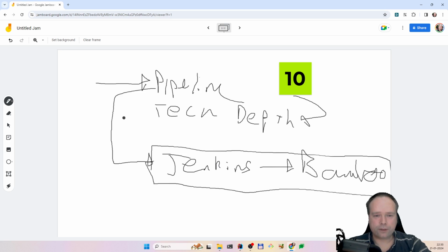And then, of course, pick up these. There needs to be an outcome. So for each problem that you have, you need to have something that you can measure afterwards. So that means that you need to create some kind of Jira with an acceptance criteria, so you know that you actually did not just talk to keep yourself warm. That you actually talked and you actually solved something, and you can measure that you solved this afterwards. That is why there needs to be an acceptance criteria. Just like when you code anything business related, there always needs to be an acceptance criteria. You need to know when you're done, and that you actually solved that.